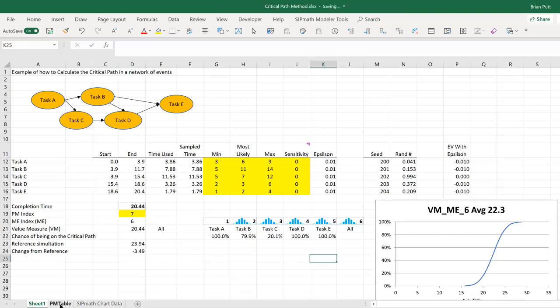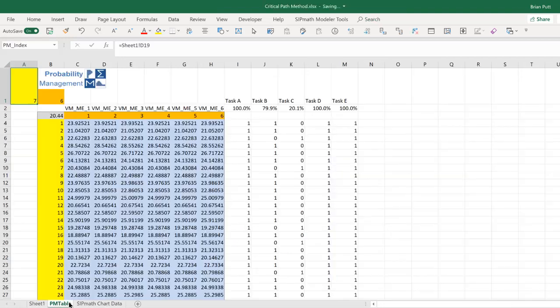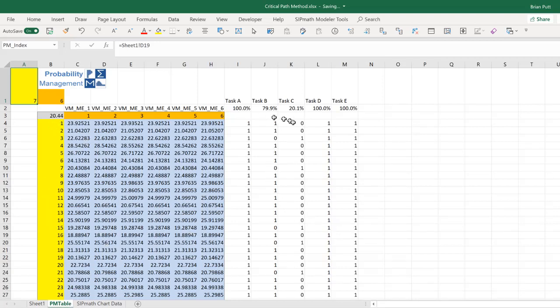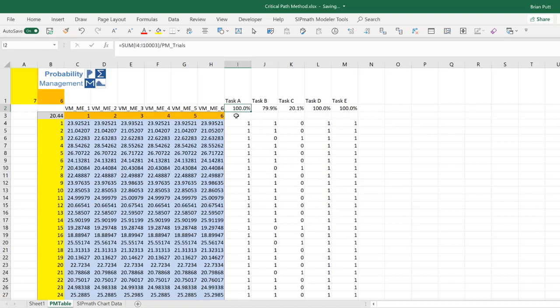So now, how do we calculate these probabilities? Well, we've calculated for 10,000 simulations how many times each of these tasks is on the critical path. Task A, if I add up all the ones here and divide by PM trials, which is the number of trials I have, which is 10,000, it tells me it's on the critical path 100% of the time.